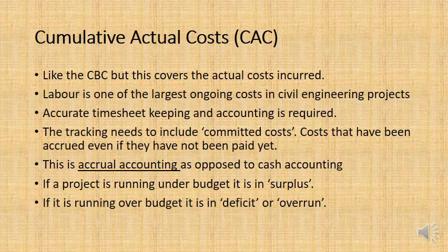You would budget $10,000 for week 5 because that is when money needs to be paid. However, you are basically accruing debt to me on a weekly basis, and that is $2,000 a week.